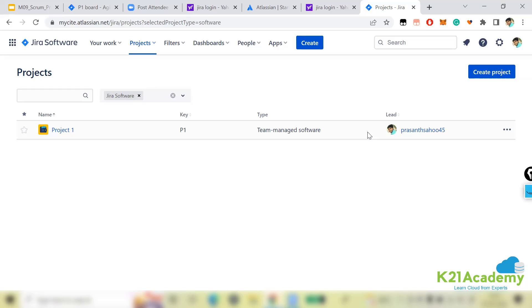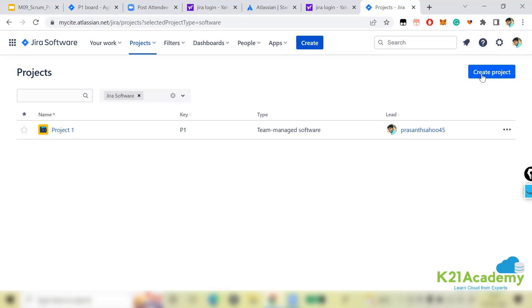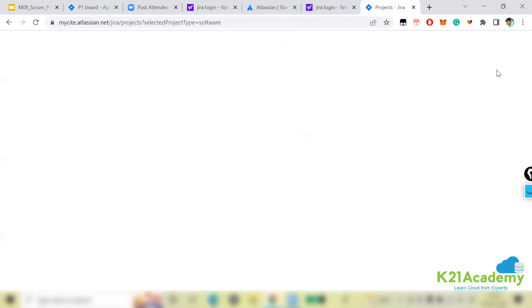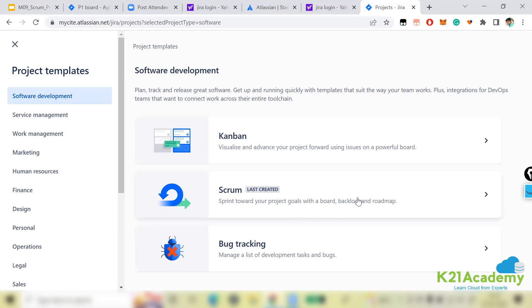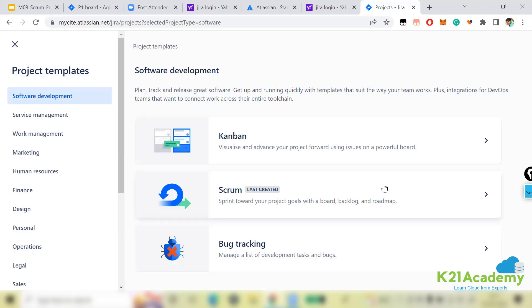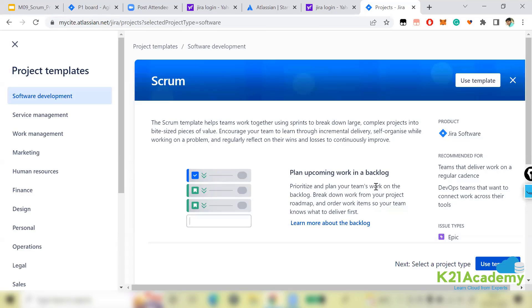So the first step is: log into Jira, select Jira Software as your product, then click 'Create Project' on the right-hand side. It will ask which model you want to use — Kanban, Scrum, or Bug Tracking. Since we are following a Scrum course, we'll select Scrum as our template.